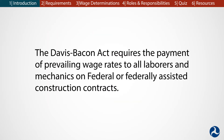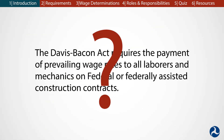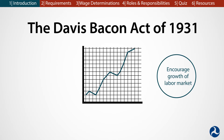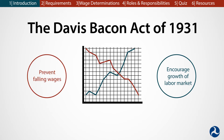The Davis-Bacon Act, or DBA for short, is a law that requires the payment of prevailing wage rates to all laborers and mechanics that work on federal or federally assisted construction contracts.